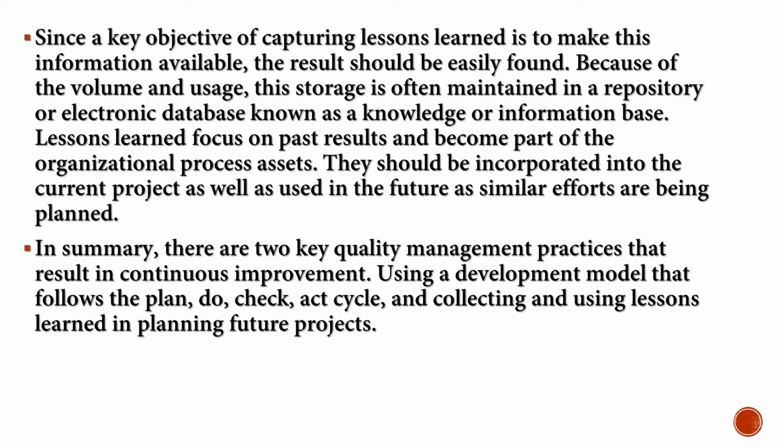Since the key objective of capturing lessons learned is to make information available, the result should be easily found because of the volume and usage. So this storage is often maintained in a repository or electronic database as a knowledge or information base. Lessons learned focus on past results and become part of the organizational process assets. They should be incorporated into the current project as well as used in the future as similar efforts are being planned.